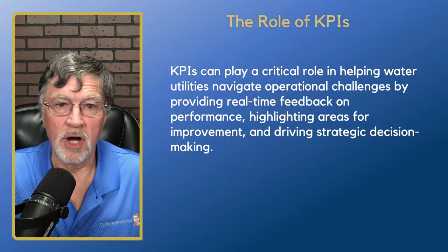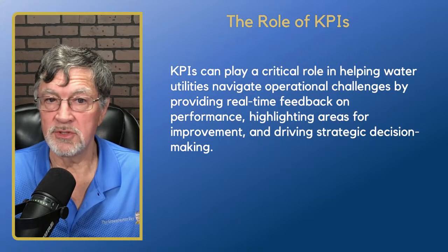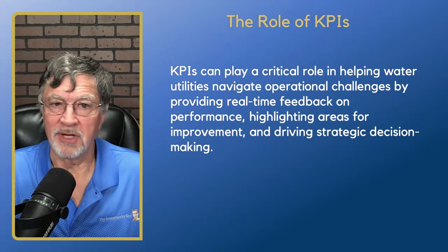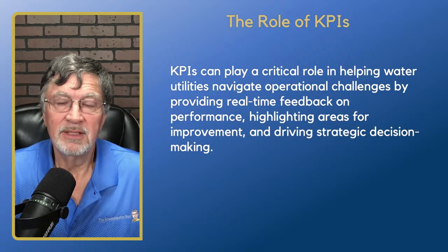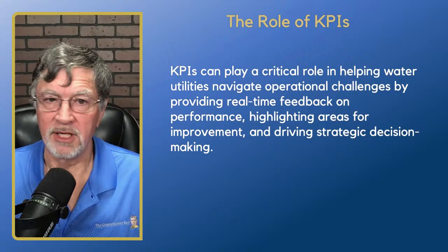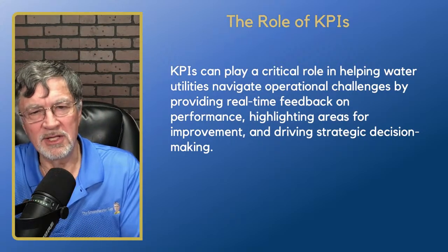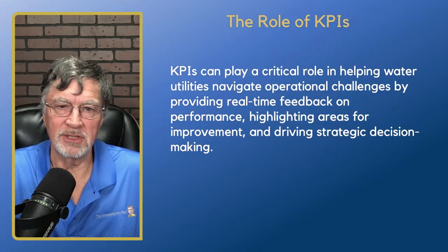And if things are headed in the wrong direction, we know that we need to do something within a certain time frame. We need to have that money available and adjust our capital improvement program to handle that. If we have a well rehabilitation we're going to need to do, we need to make sure the money is there for that. So by tracking these trends, we can make adjustments to the efficiency of the operation.